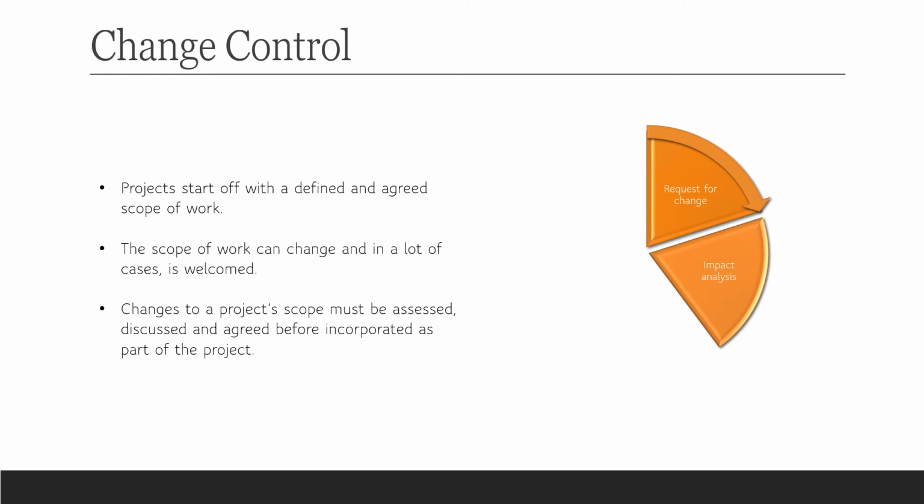The next thing you do is you do an analysis of how much impact this change is going to bring. Like I said, you're not about to tell the CEO that, no, that's not going to happen. You want to go and give it some thought. So you bring it into that space with your colleagues, and you have a conversation, and you measure the impact that this change will bring. So the CEO said he wants 2 things added to this project. You've done the analysis. You find that not only is it going to cost X amount, it's also going to take this long, and it also requires these resources. That is the impact that has to happen for this change to be incorporated.